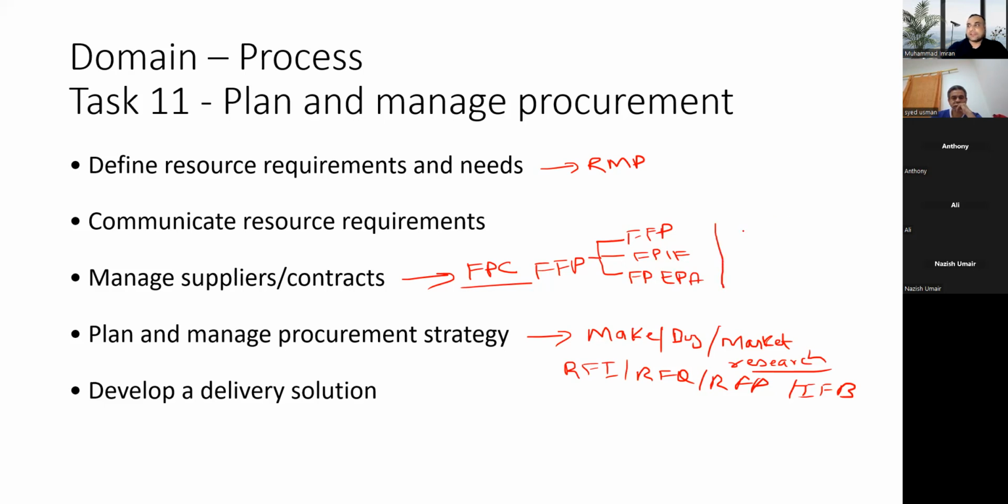Or if it is agile or the scope of work is not well known, we can use a cost reimbursable contract. And it also has three types: cost plus fixed fee, kind of a lump sum type of thing, that there's a cost plus there will be fees. We have cost plus incentive fees, if they achieve some objectives or to motivate them for objectives, and cost plus award fees, which means we will pay for all the legitimate costs, but fees will be based upon my performance.